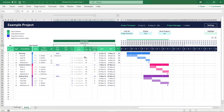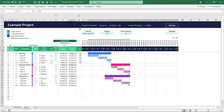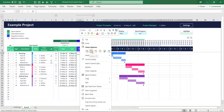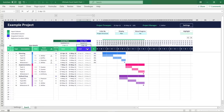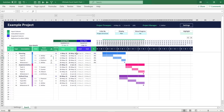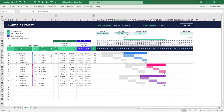You can document the date of the latest update to the actual project plan and then, to preserve a snapshot of that plan, open the base plan section. Taking a snapshot is as easy as copying over the start and end date columns as values and then documenting the snapshot date. When time passes and you make changes — for example postponing the project start — you now have the actual plan and the original base plan side by side, and can easily visualize the comparison by changing the display mode to the plan versus base comparison. That mode instantly reveals shifted dates and changed durations while making the timeline perfectly display both schedules.